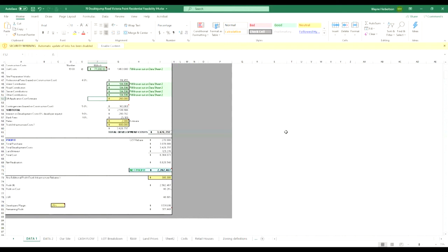But if they've got very good people supporting them, there have been people get through, and it's code accessible. The key word here is, if you do a code accessible development and you work in with the council and don't try and challenge them to do something different outside the norm, then you can get your DA through very quickly.